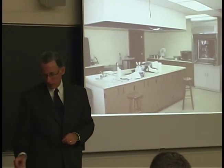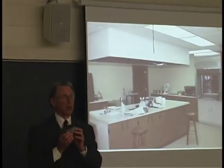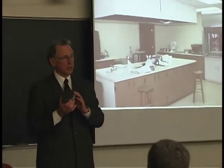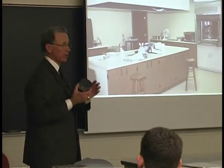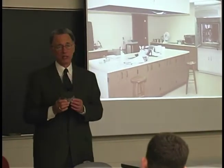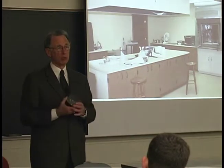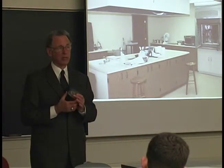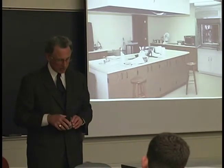But as far as the mix, the composition of this, we do have leeway on the composition of this product. We will come up with a mix design in our laboratory, and then IDOT will have to approve that mix design. They won't let you just go out there and put anything down. They have to approve it, but we can come up with a mix design that may be less expensive for us to make than some other mix design.